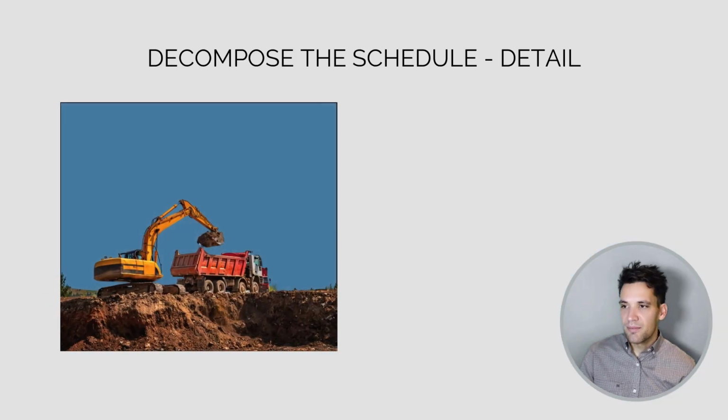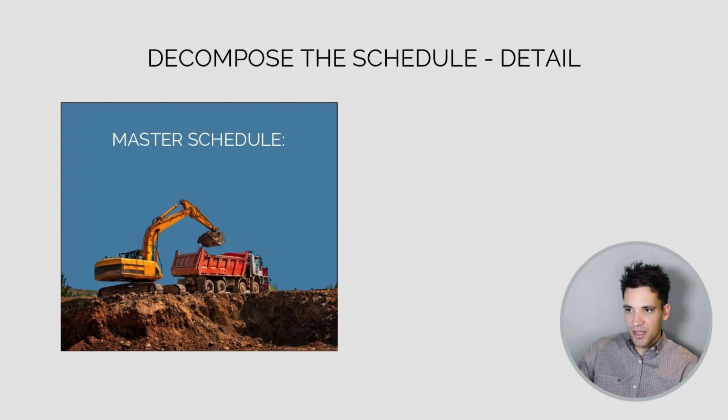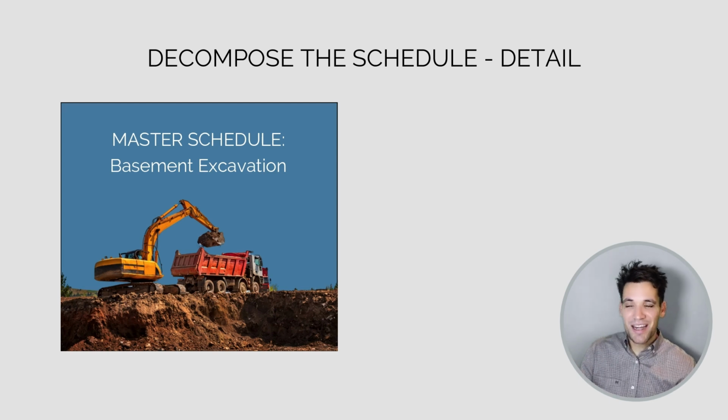Let me give you a quick example of what I'm talking about. So in the master schedule, we have basement excavation. That's a task with a start and finish date that probably won't capture any more information than that. We know the start date of the excavation and we know a planned finish date that the planner developed, probably based on quantities and assumed productivity rates.